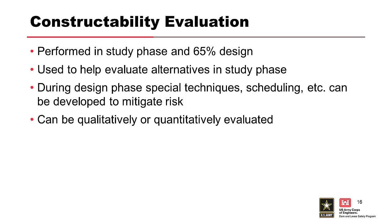All construction risks must be identified and properly mitigated with the objective to reduce them to tolerable levels. During design, special elements and specification requirements can be incorporated to mitigate and reduce construction risk. Construction risk can be evaluated using two methods depending on the complexity and level of risk involved — qualitative risk assessments using engineering judgment, and quantitatively using event trees.